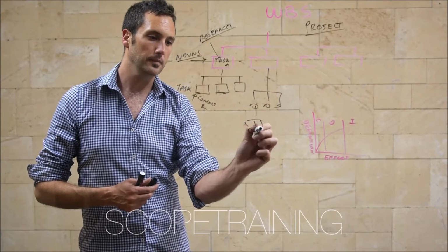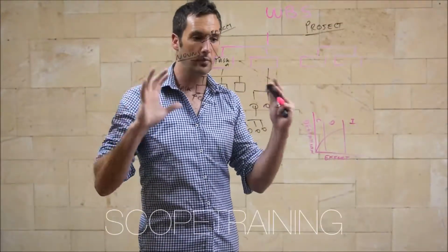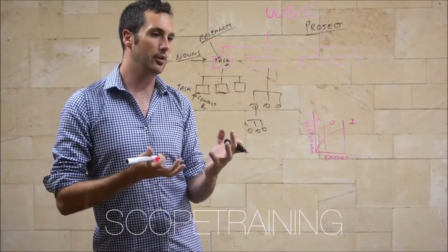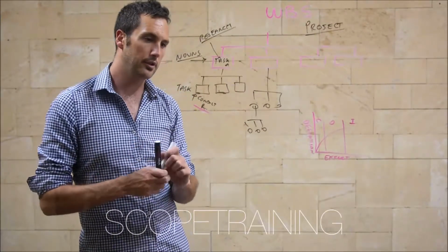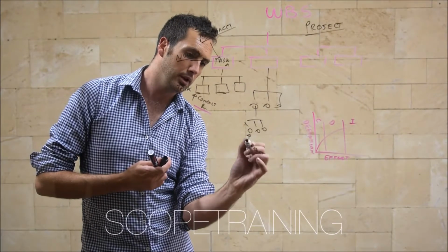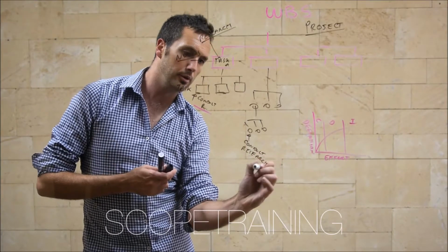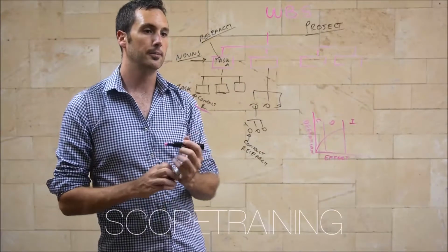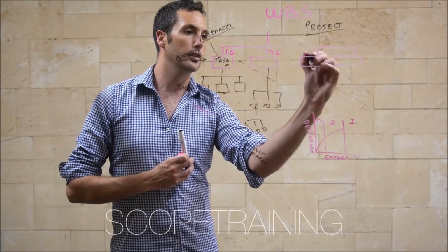As you start going through, as I said, moving to the development phase, you will go through and break this down. Okay. So, what about the numbers? A lot of people say, what are these numbers and where are they creeping from? In a work breakdown structure, in order to have every task as a unique task, so for example, here I've got the task conduct research. A task by the same name may also need to occur in this aspect. So in order to not duplicate work, often what we do is we assign a unique number to each task. The general convention is by using these numbers.